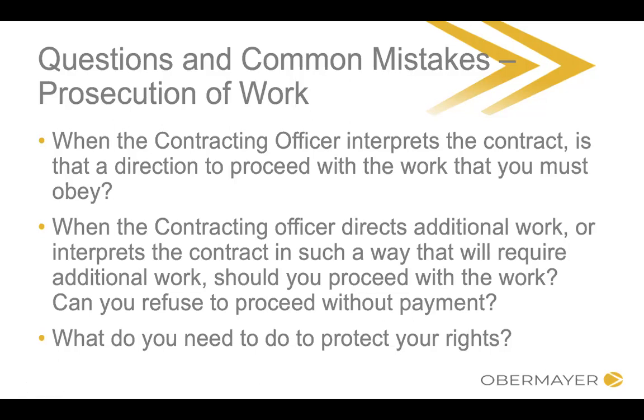Same thing, if the contracting officer directs additional work or interprets the contract in such a way that requires you to expend additional money, do additional work, do you need to proceed with the work? Yes, you do. Can you refuse to proceed until you get a mod or until you get payment? No, absolutely not. You do need to give notice that it's a constructive change, or if it's an express change, you need to give notice that you didn't get paid enough under the mod. And you need to, like I said, make sure that you don't sign any waiver language in a modification that says you're waiving your right to be paid or to get additional time on your contract later.